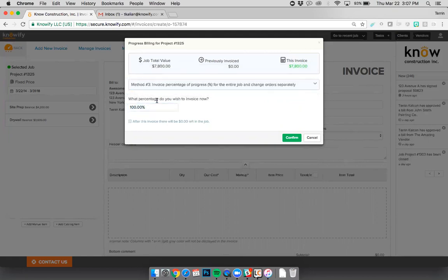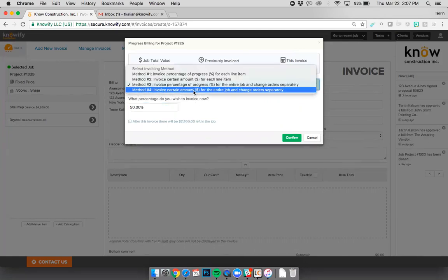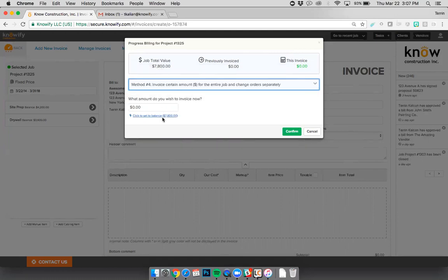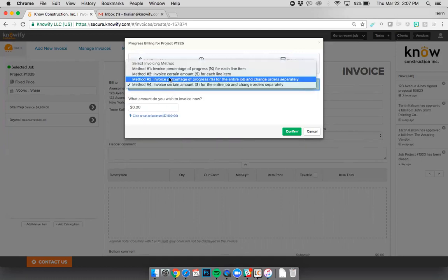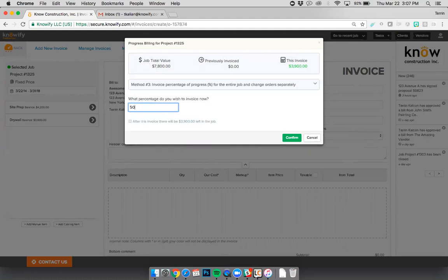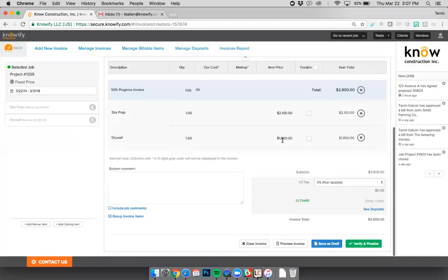And so if you invoice on draws that say a 50% deposit upon signing, then 20% at this phase of the job, and 30% at the end, this way I could say we want to invoice X percent of the contract in general, and we can also do that one in dollar figures as well. It really just depends on how you prefer to see this and how you want to send it to the client.